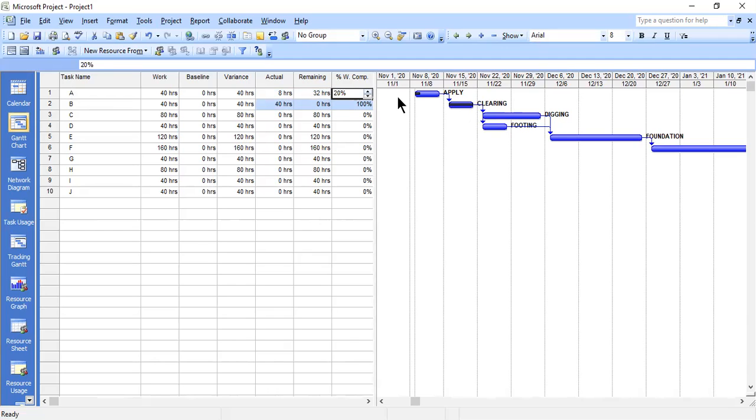But for this one, if you remember, if it was 0 the way it was, you find that it is 40 hours which is needed and you have done nothing. But if you can do 50% of the work, you discover that it will be 20 hours. It means you have covered 20 hours, and what is remaining is what? 20 hours. And it will show here that you have covered all these things very well.